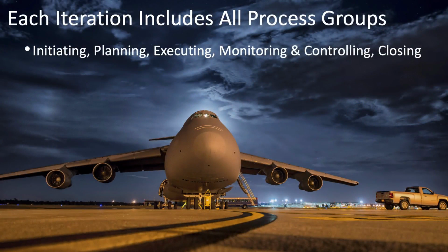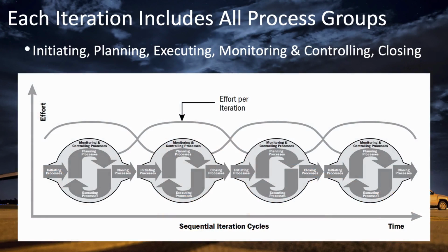When you have iterations, each iteration has a full set of each process group. Each iteration has initiating processes, planning, executing, monitoring and controlling, and closing processes. And these are repeated for each iteration.